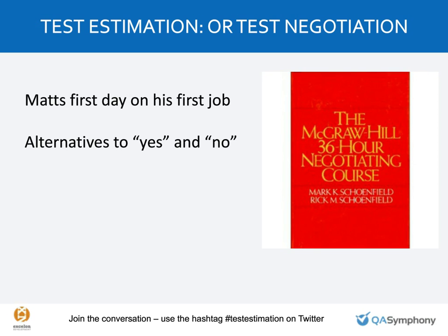Now I could say, but if you gave me a month, I could do all these things. If you wanted in 2 weeks, I can give you this. If you want, we split the difference, we could get to here in 3 weeks. That's a very different conversation. It's transparent. It's based on performance. Well, Joe thinks he can do it in 2 weeks. Okay, great. Let's give the spreadsheet to Joe and see how long he can see his progress.